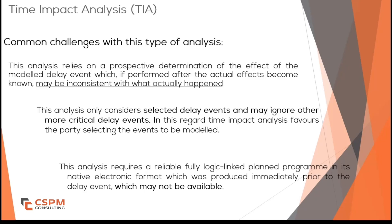It is also important to note that TIA is prospective — it doesn't account for what actually happens during the delay itself, which could be critical in understanding the full impact of the event. The analysis is based on the assumption that the delay will have the same impact as it would if it occurred exactly as planned, which might not always be the case.